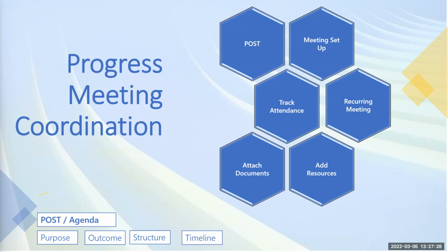Or another thing is, if those people are not able to attend and you have one person that is able to attend, you can communicate it to them to say, okay, this is a decision that has been reached at the meeting. Are you happy with it to go ahead as well? That's after the meeting, after that decision has been made, just to make sure that you get their decision, maybe in writing and it's been documented, so that they won't come back and say, oh no, I didn't agree to it, I wasn't at the meeting.